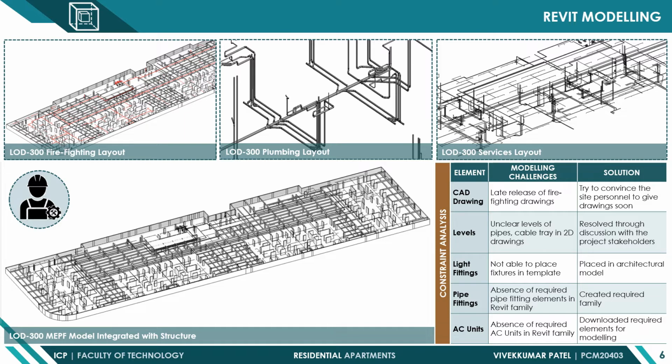The main challenges faced during this modeling are the late release of CAD drawings, unclear labels in the CAD drawings, and absence of Revit families. To solve these issues, we discussed the levels of services with the project stakeholders and created the required families in the software to create the model.